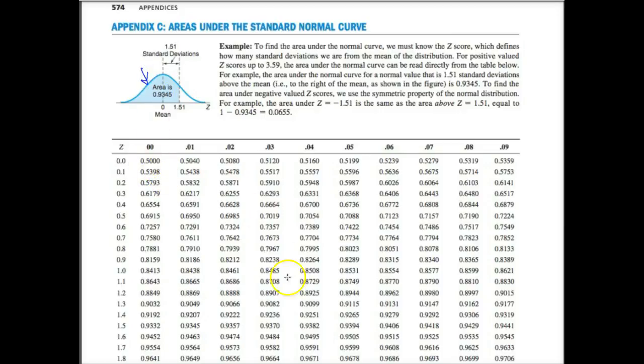And the probabilities that you see, the numbers here, are just probabilities, or the area under the curve of this. And here we said that 16 weeks actually equals about 0.57 standard deviations above the mean. So when we come here and read this, we split this out to be 0.50 plus 0.07. And based upon these two numbers, we're going to find the intersection of that in this chart so that we can see what the probability is, or the area under the curve.